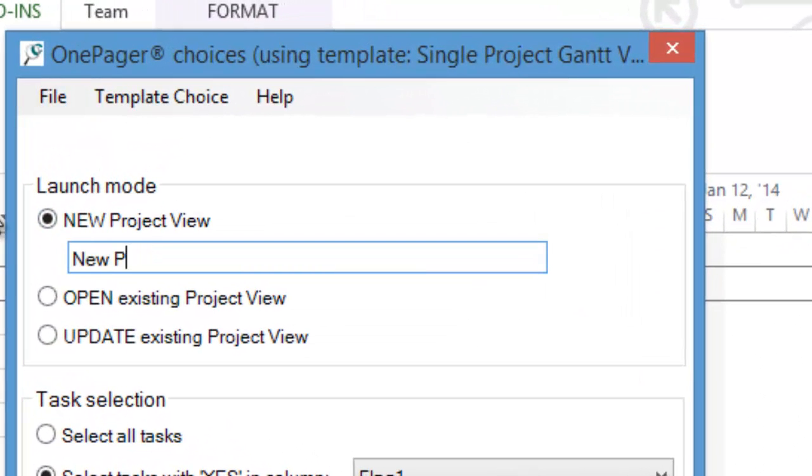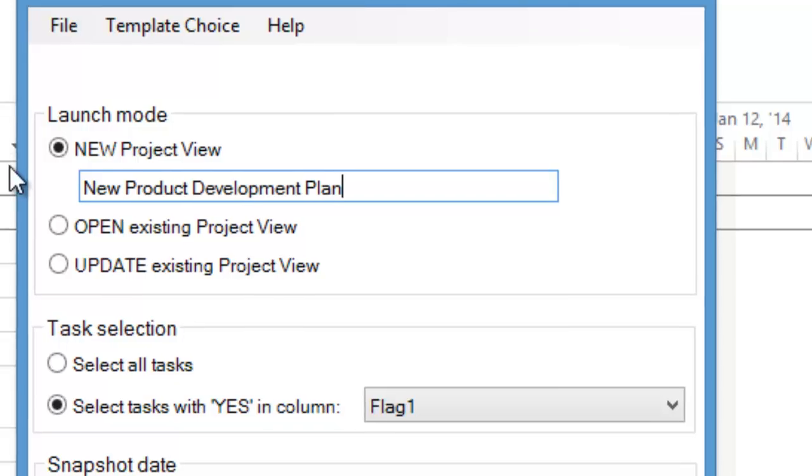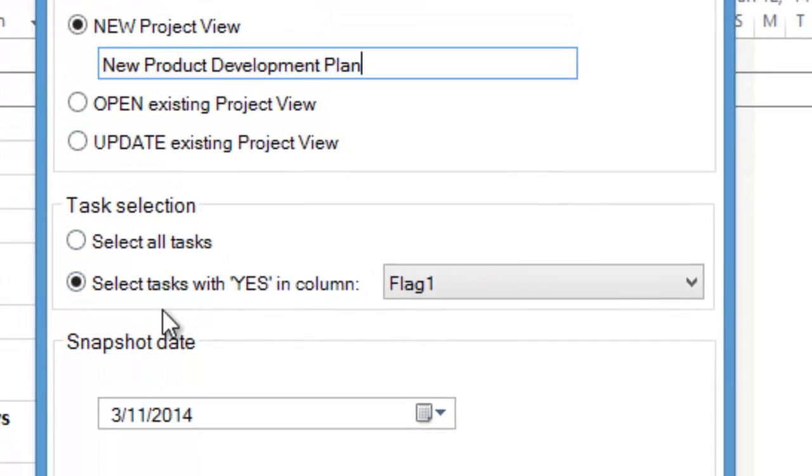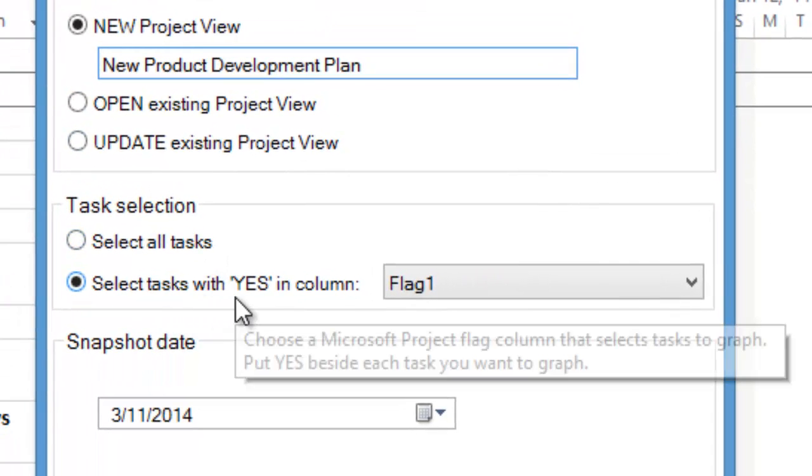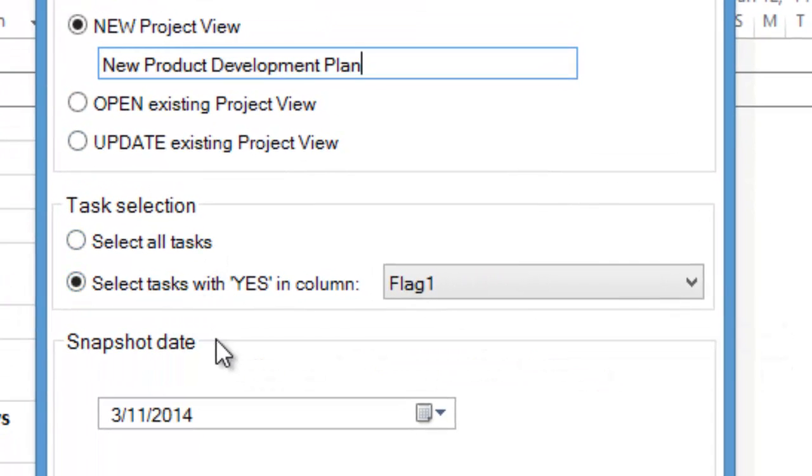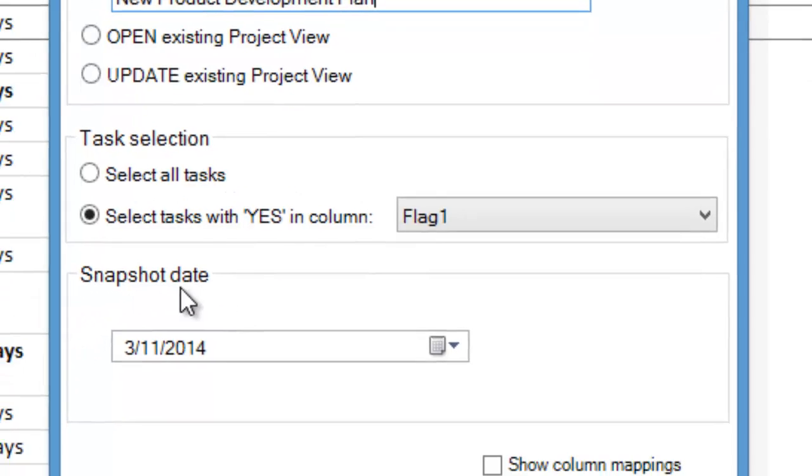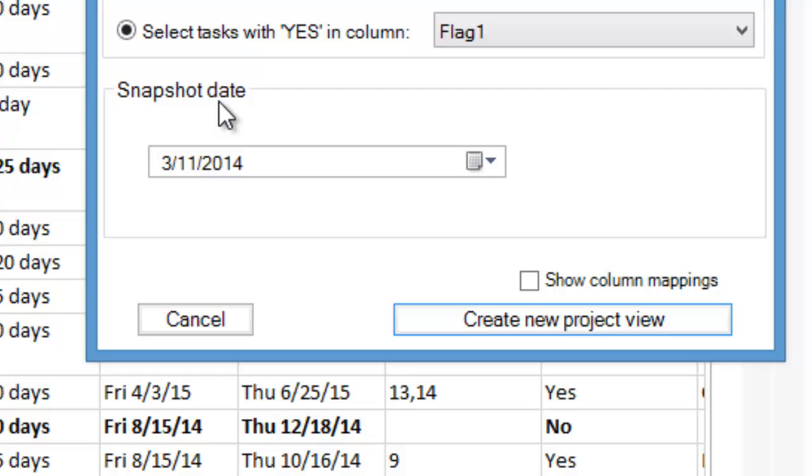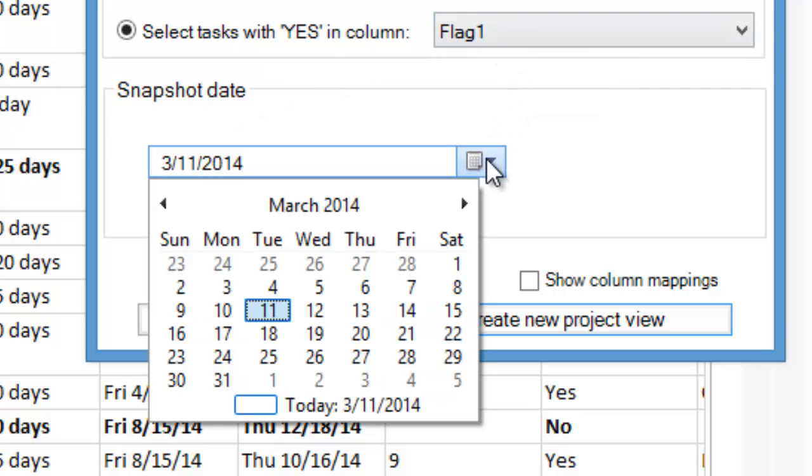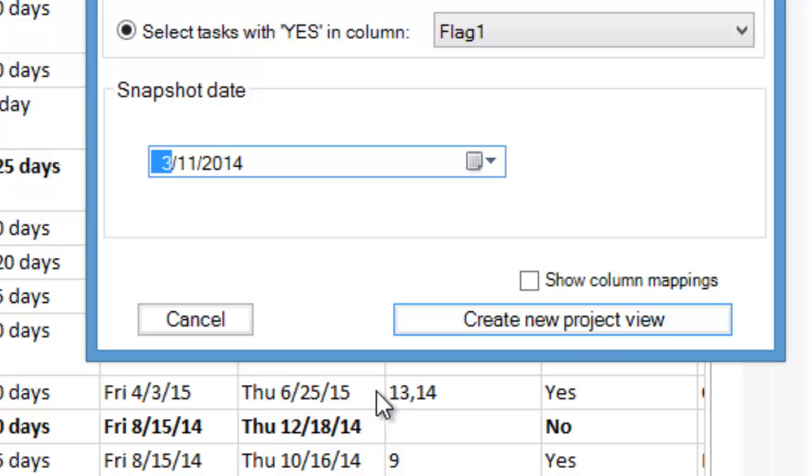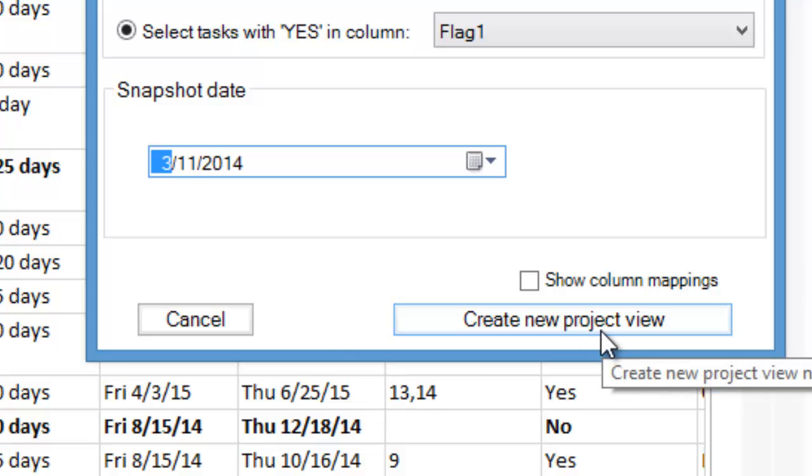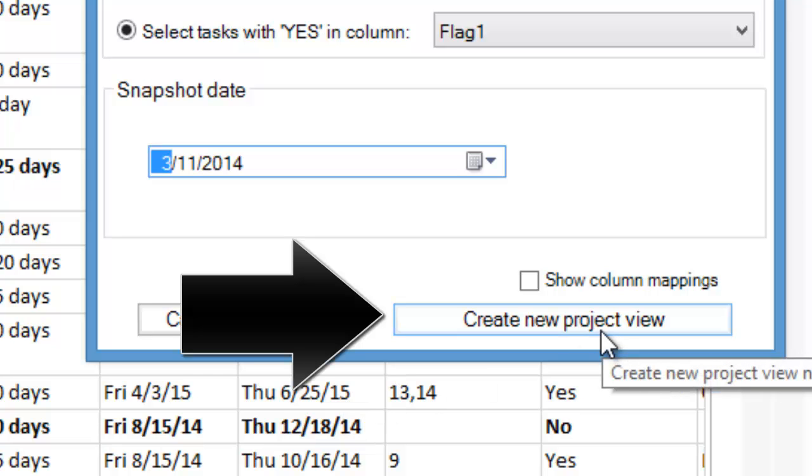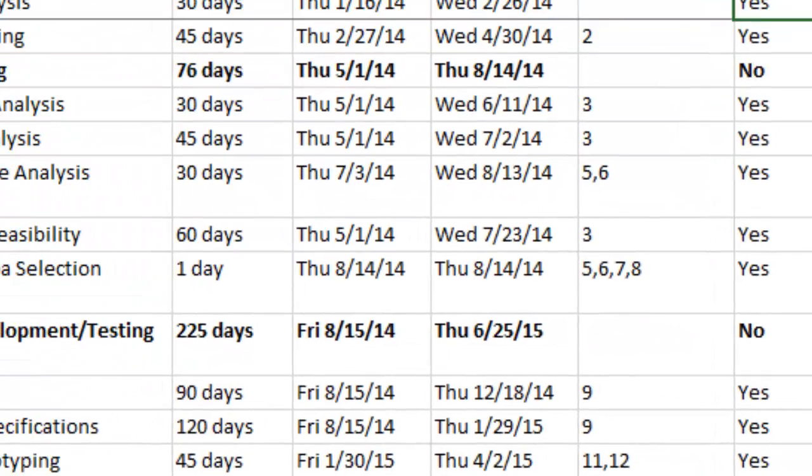OnePagerPro will launch and ask you to name your project view. In this example, we'll call it New Product Development Plan. This screen also allows you to choose which flag field you want to use to import your Microsoft project data into OnePagerPro. You can also specify a snapshot or status date of your project plan. In this example, we'll use today's date. Now, click the Create New Project View button.